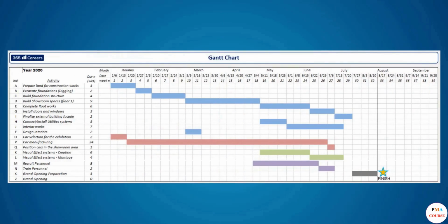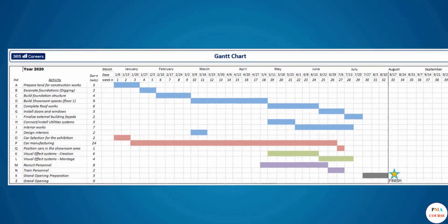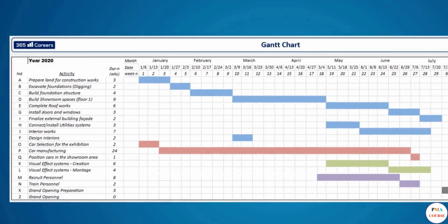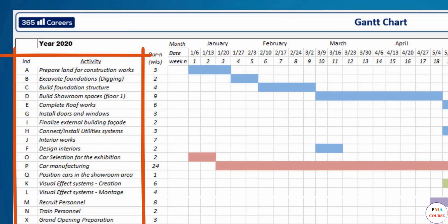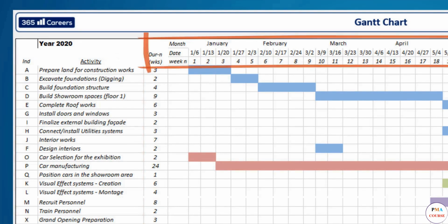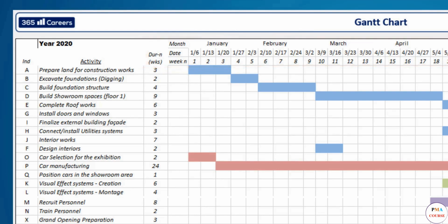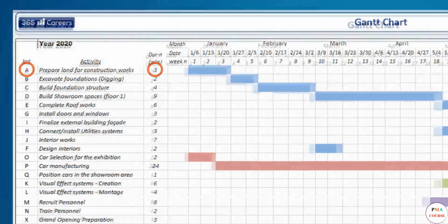The one we mentioned way back in the history lesson, remember? The Gantt chart represents something very simple, yet extremely useful. It lists all the activities from our activity list on the y-axis of a table. A calendar with days, weeks, and months is positioned on the top of the table, the x-axis. The durations of the activities are drawn right below the calendar day. You can now see the start date and the end date, with the difference equaling the duration of the task.